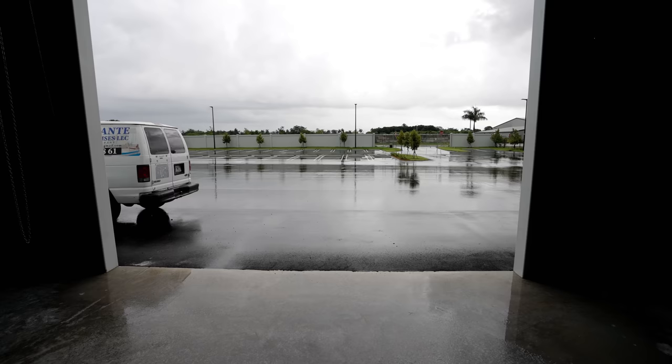Once we do that, we're going to put the boat in the water, schedule it with a customer. They're going to come in and actually take delivery of the boat. That day, we're going to spend somewhere between 4 to 6 to maybe even 8 hours, depending on what size boat they have, on the water with them, teaching them all of their systems, how to use their pumps, whatever options they put on the boat, even down to just the basic stereo system. We're going to spend that day with them, get them dialed in, answer as many questions as possible.